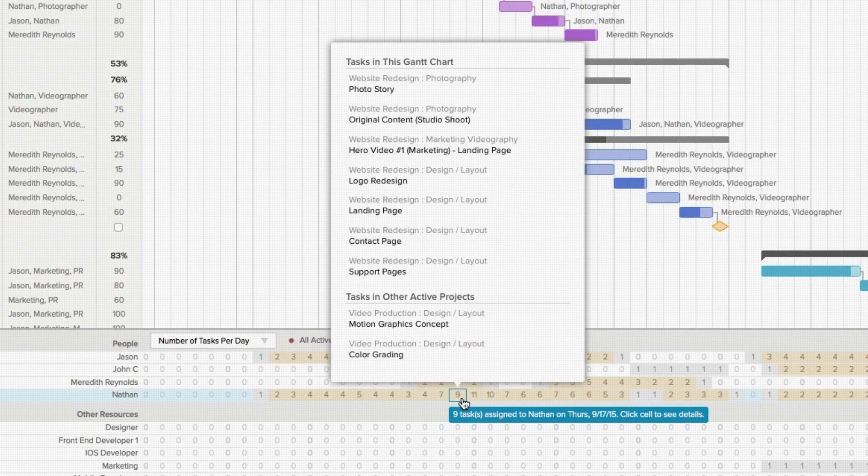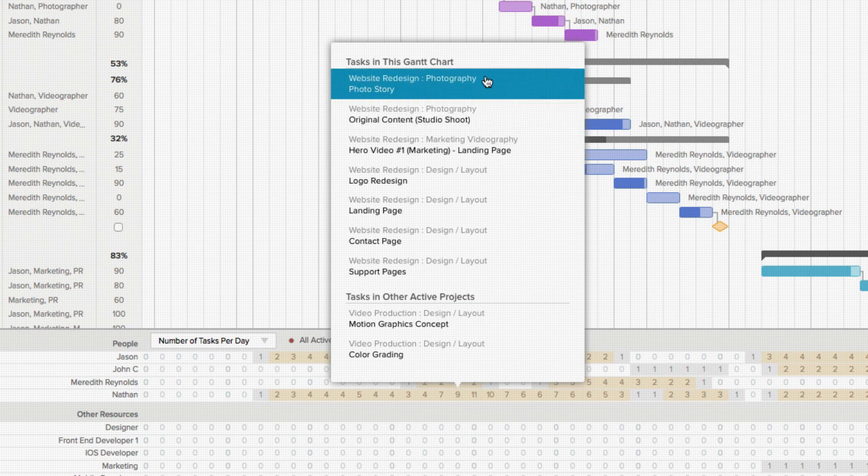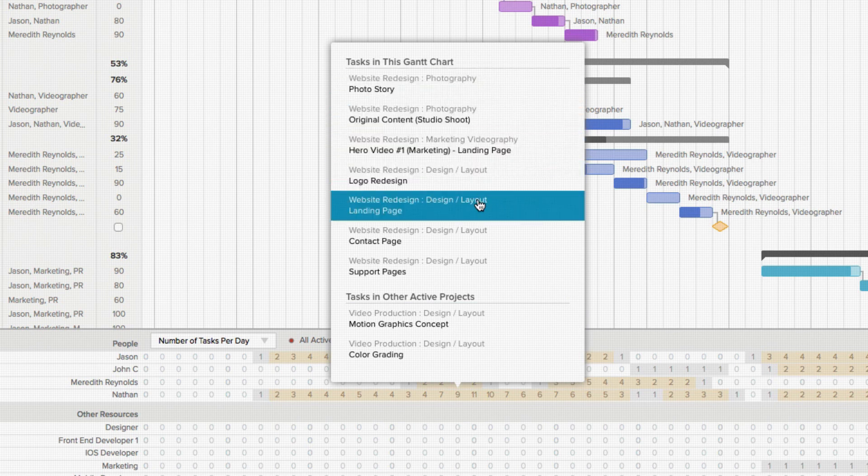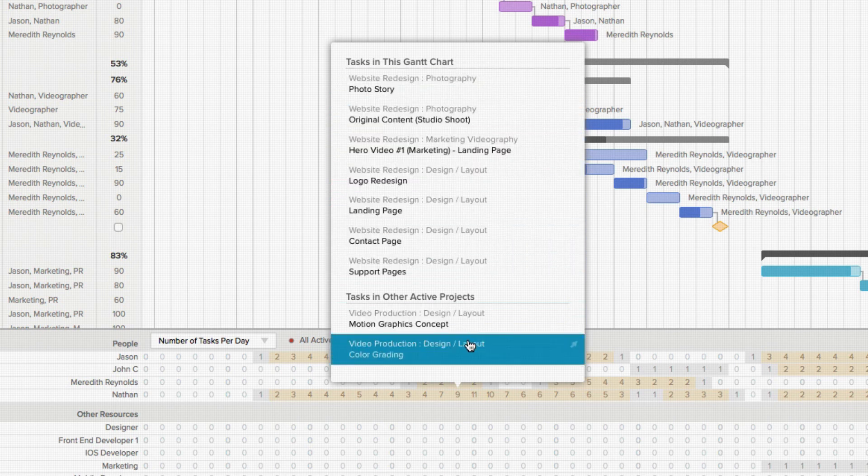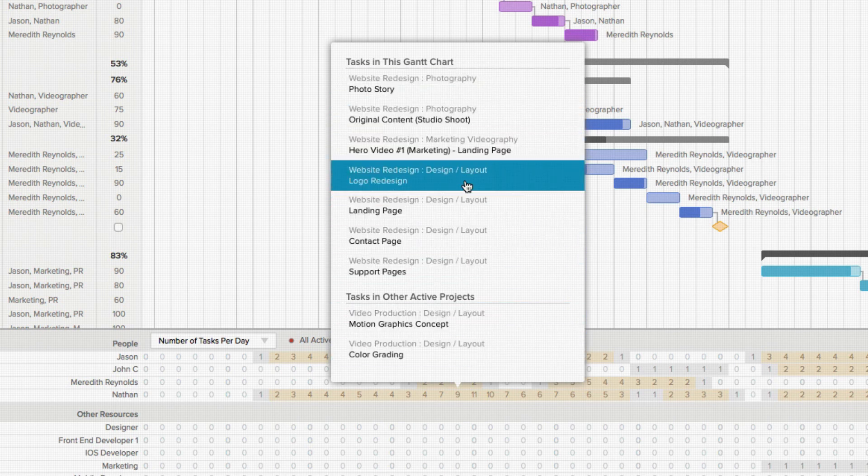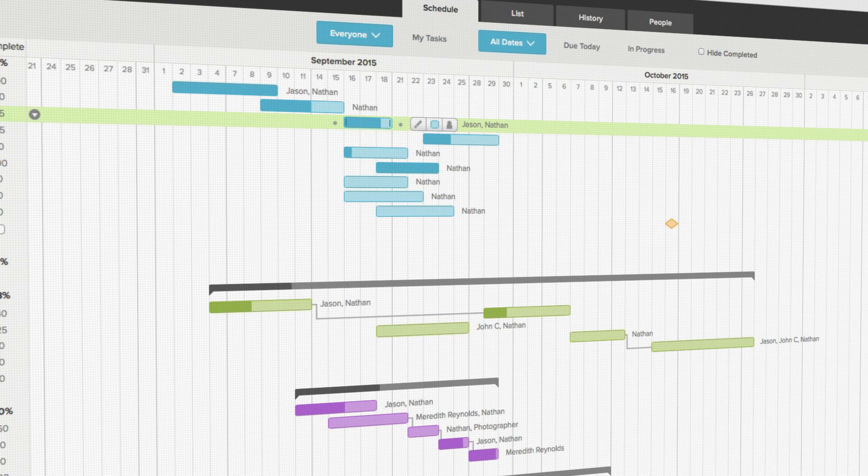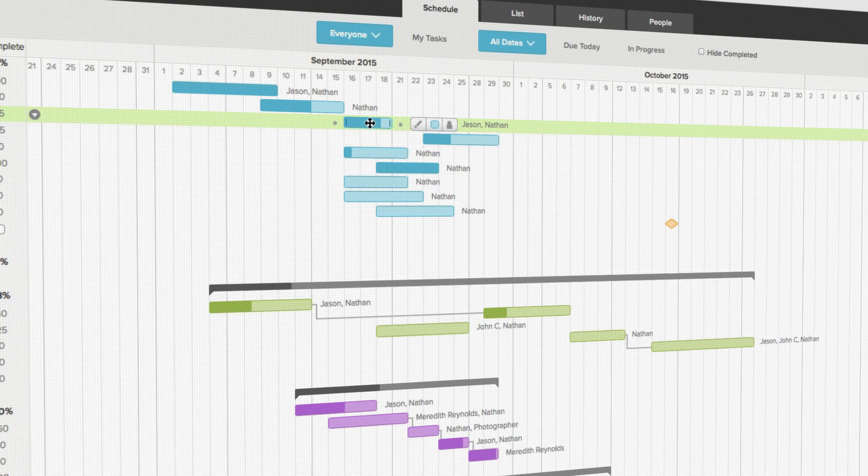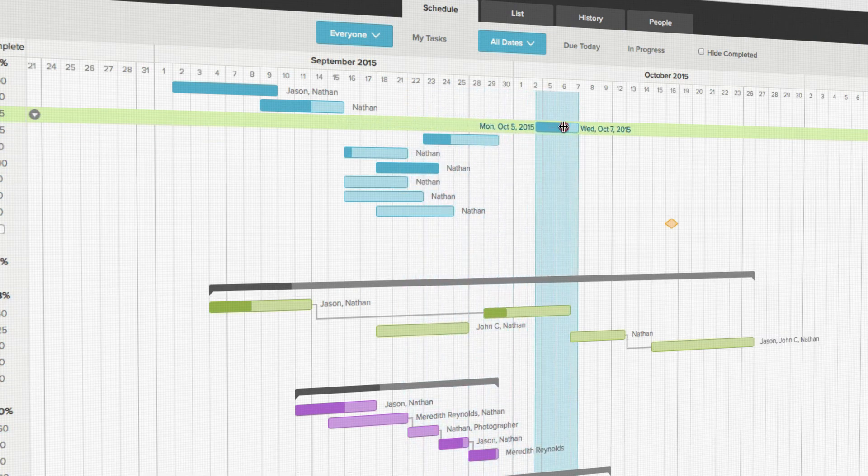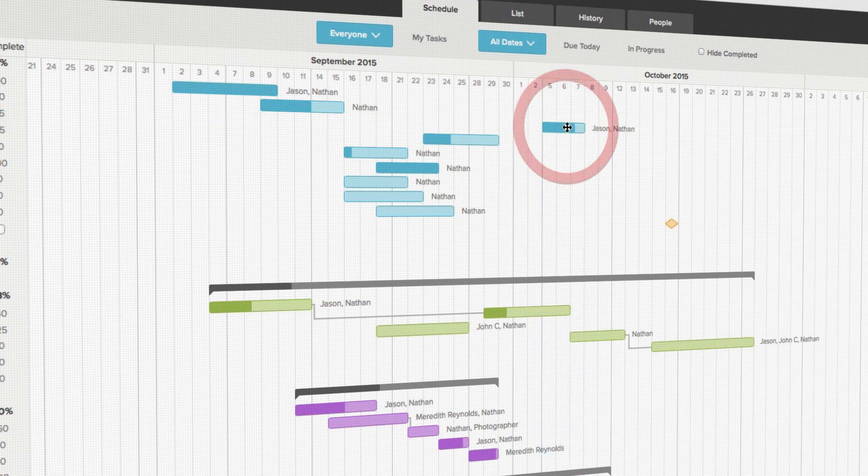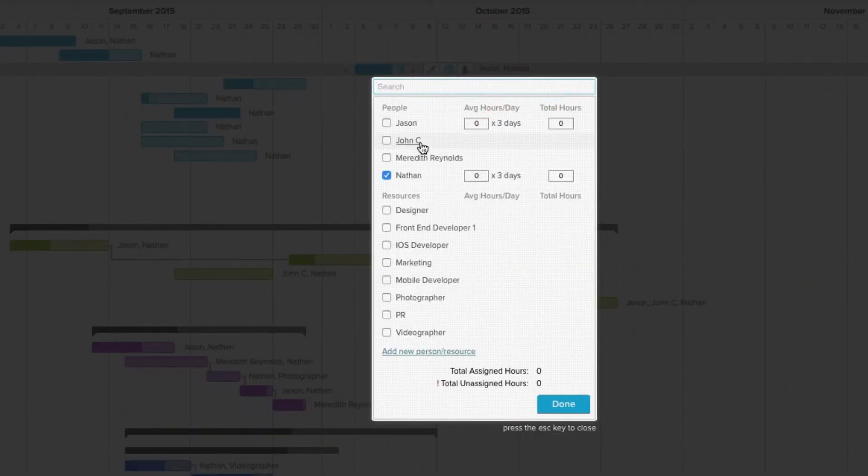If I click on the number of tasks assigned, I'll get a detail window that shows all of his assigned tasks. Clicking on any of the tasks in the pop-up list will take me directly to that task in the project, so I can either reschedule it for a time when Nathan's workload is lighter, or just unassign him from some of the tasks.